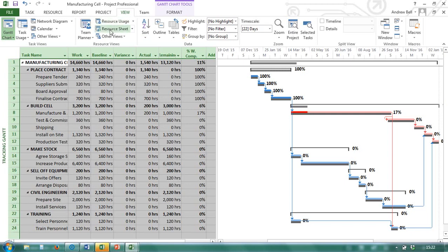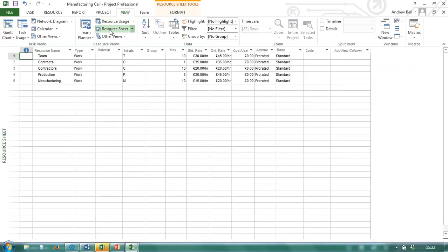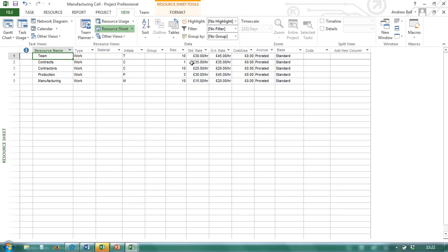The resource sheet view is just a table of information. This is things in the database associated with resources. For instance, their name, how many we have, their pay rate, their overtime rate, what calendar they work to.